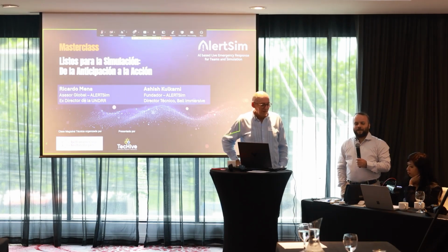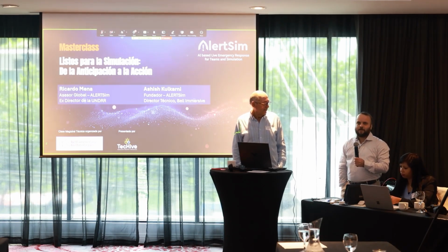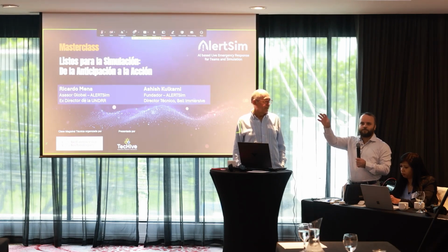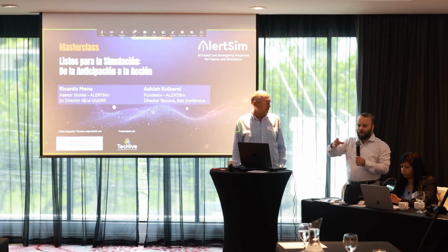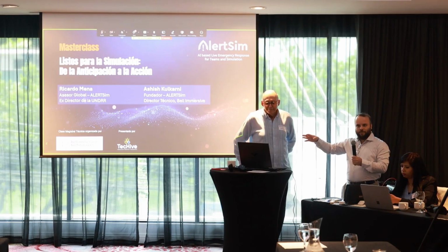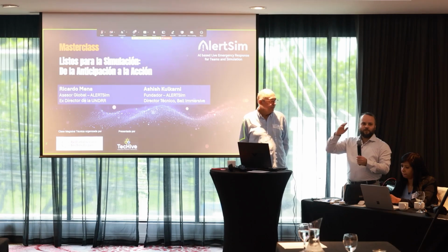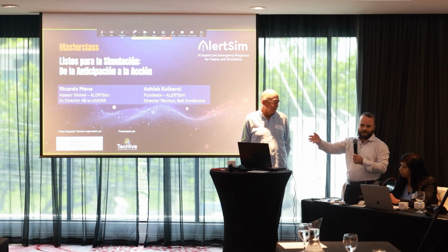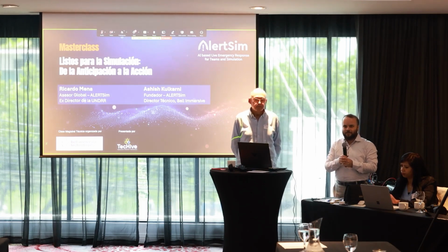It does to some extent, but whether it can really think out of the box and come up with a solution, I haven't tested it to that extent. But like a resource problem, in one of the simulations, it said that you need more spares for this particular equipment. It was a what-if scenario: what if this pump goes out of order. So it determined the cost of the pump not being there, how long it will take to come. Then it suggested that instead of calling after it breaks down and then procuring, why don't you keep three spares? That will give you a lead time of so much. That kind of recommendation it does come up with.